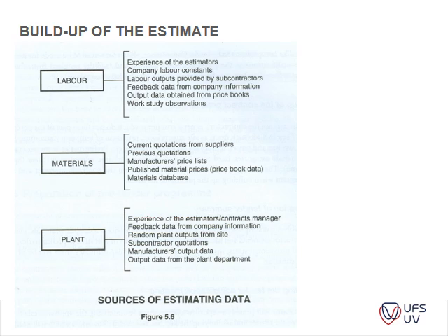Okay, then build up of your estimate. This is very important for me. You're definitely going to use this in your tasks, and you will be tested on this. If it's not in informal assessments, you will be assessed on this in your tests, etc. You must be able to build up and explain how rates are built up using your labor, your material, and your plant.